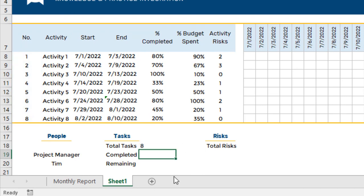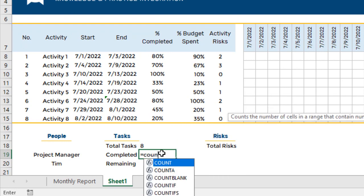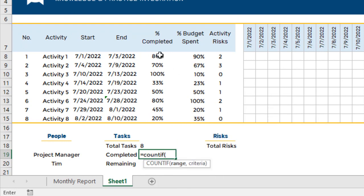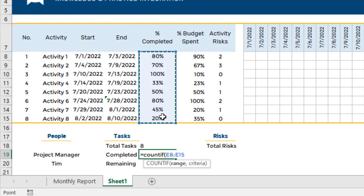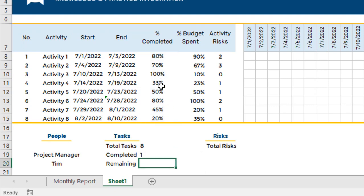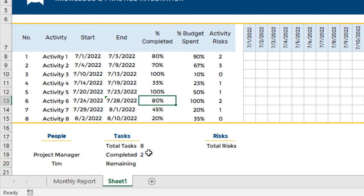For completed tasks — as you know, if a task is 100% it is considered completed. So I'll write equal sign, COUNTIF, open parenthesis, select the range, comma, and the criteria will be if the number equals 100% — write down 100%, close the parenthesis, and press Enter. As you can see, only one activity is at 100%, so it shows one here. If I make another one 100% as well, this will become two.